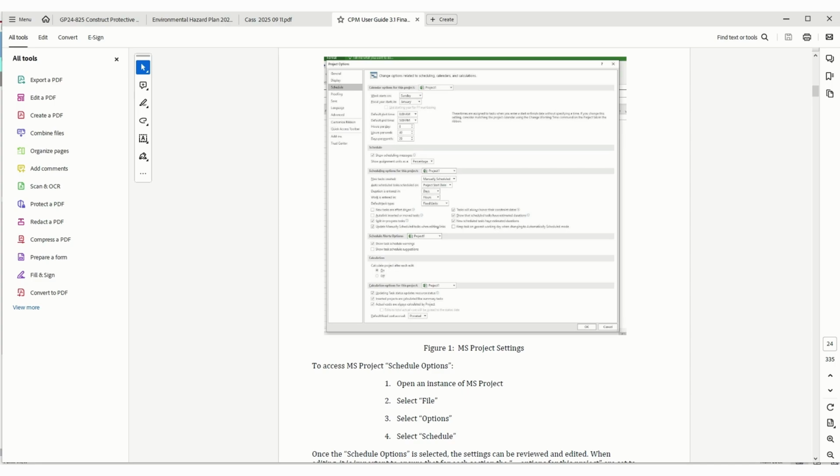So we're going to say here we are placing form work for some type of pad, whether it be a canopy, whatever. So you're going to use your master activity number of concrete. You're going to do concrete. You're going to do your number 310, concrete forming and accessories. Your sequence number you can change to whatever you want, all the way up to 99. Right now we're just going to leave it 0, but you could change the title to placing form work.